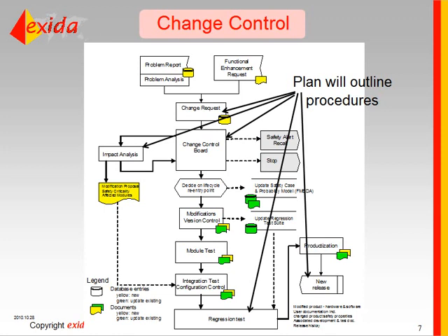So certainly there are some kinds of changes, like if you're just painting it a different color or something basic like that, the impact analysis is very simple, and you say, no, the safety is not affected at all by this. None of the safety components are changed. But if you're changing specific software related to the safety function, then obviously that could affect the safety, and you need to make sure that it doesn't. And what needs to get identified in the impact analysis is essentially what verification measures will be put in place, what kind of checks and tests and reviews, etc., will be done to make sure that the change does not compromise the functional safety.